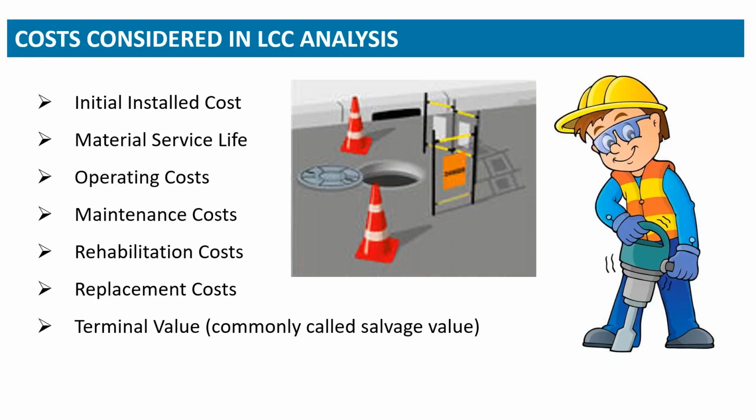The main concern, or primary concern, in dealing with the rehabilitation of collection systems is to remove inflow and infiltration. So you can thereby minimize flows and minimize the cost of treatment by not treating water that's clean in the first place. That's operating costs, to lose the cost of treatment of extraneous water. Then there's maintenance costs to consider.